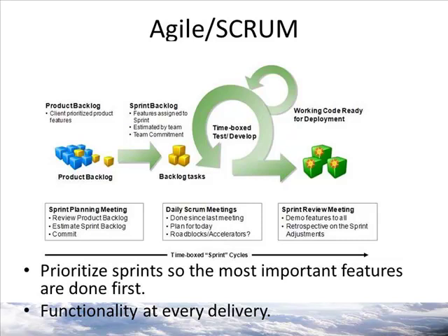And then you develop each sprint. You don't have a formal requirement specification, but the features, your little cubes, are representing the requirements. So you don't spend a lot of time on documentation, and you take all the features that you put into sprint 1 and you rapidly develop it in a period of 3 to 4 weeks.